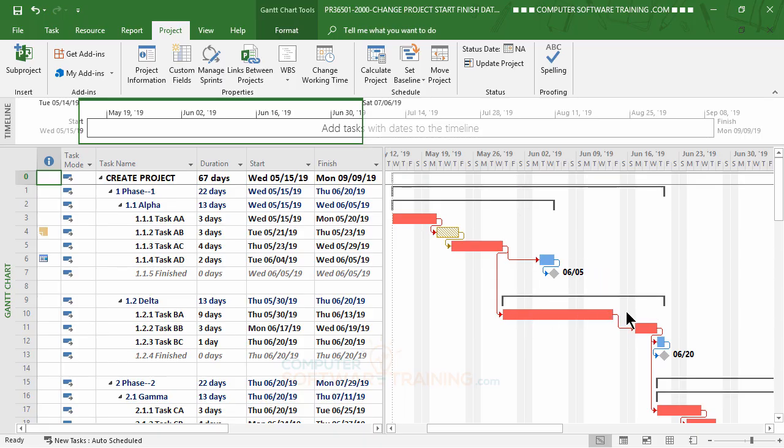Everything here got extended. The duration didn't change, but the length of the bar changed because you now have Fridays that you're not working. So this bar here is 2 segments longer or wider because of Friday here and a Friday here. Okay? So that's what happened. Though it was originally 9 days, it's still 9 days. 9 days of work, 4 days during that of time off, basically, or actually 6 days that you're not working. All right, anyway, how do we get it so where it'll show the gray?